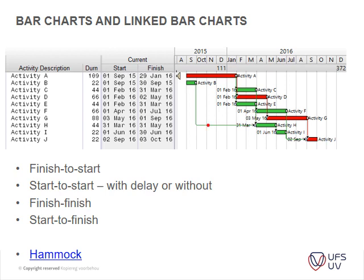In a linked bar chart, one item is linked to another, but you may have different relationships between your links. You may have finish-to-start: once one activity is finished, the linked one starts. Then you have start-to-finish and start-to-start: when this one starts, the other one will start as well. You may also have a delay built in - for example, two days after one activity starts, another can start. Then you have finish-to-finish: when one activity finishes, the other has to be finished as well.